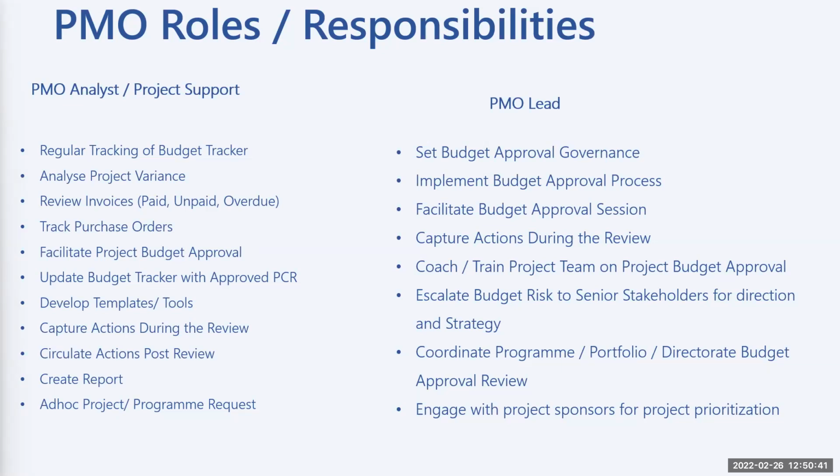So a key responsibility for a PMO person, and this could be a PMO lead or a PMO analyst, is that you could create a project tracker. It doesn't have to be something complicated. It's just showing what the budget is, what the forecast is, what the actuals are, and tracking them regularly. You track the year-to-date view of where we are, and the forecast to complete. So analyze the project variance, review the invoices.